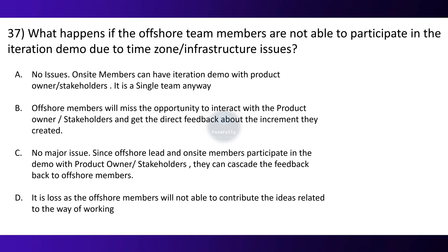Question 37. What happens if the offshore team members are not able to participate in the iteration demo due to time zone or infrastructure issues? Option A: No issues — on-site members can have the iteration demo with product owner stakeholders; it's a single team anyway. Option B: Offshore members will miss the opportunity to interact with the product owner stakeholders and get direct feedback about the increment they created. Option C: No major issue, since the offshore lead and on-site members participate in the demo and can cascade the feedback back to the offshore members. Option D: It is a loss as offshore members will not be able to contribute ideas related to the way of working. The correct option is B.